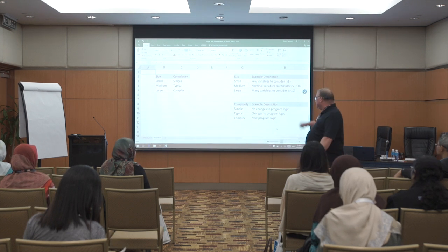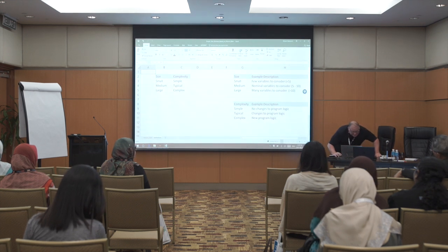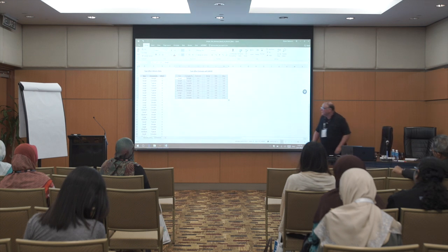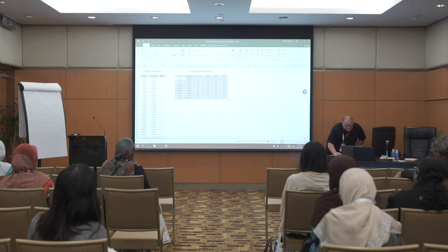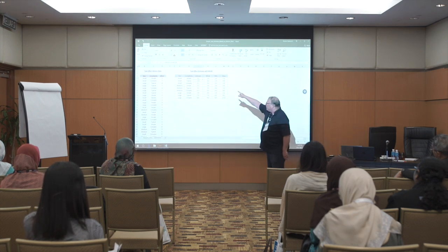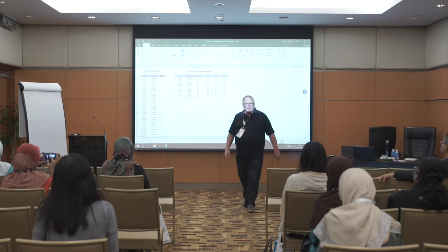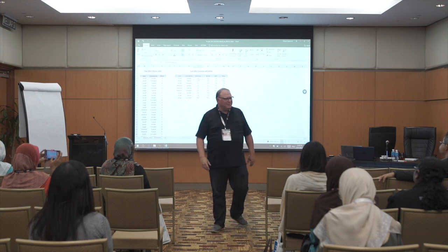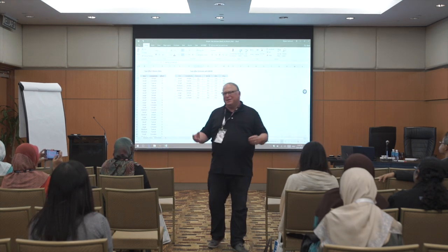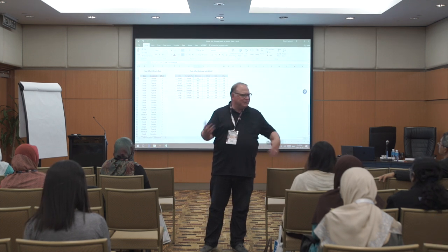And once you've got that, pump it through, and it'll give you the calculation, and it's basically here on this spreadsheet. The actual calculation for the estimate is 4 times K5 plus L5 plus M5, divided by 6. That's the PERT estimation. That's it, that's all. It's simple, it's practical, over 10 years of use. It makes things real, it gives you good estimates, as long as you don't keep changing your teams and everything.